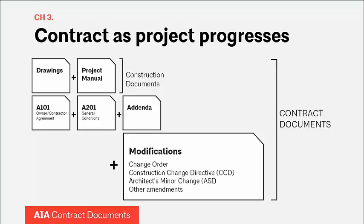Key takeaways: construction documents do not equal contract documents. The drawings and specs are part of contract documents — they describe the project scope and are enumerated in the agreement between owner and contractor, listed in the A-101. What are not contract documents? Instructions to bidders, other bid information including the contractor's bid — unless specifically included in the agreement — are never included. Submittals such as shop drawings are not part of the contract documents, and RFIs are not part of the contract documents.